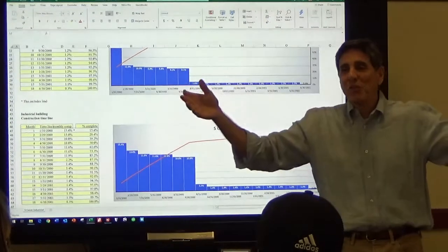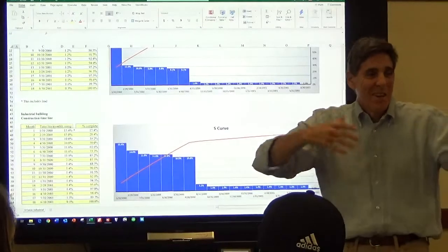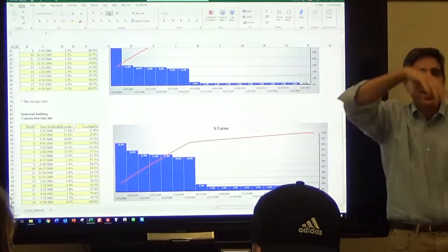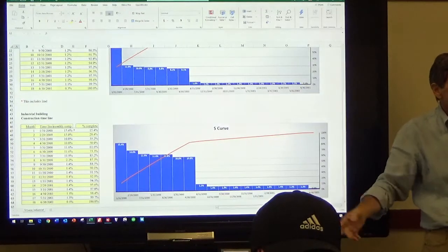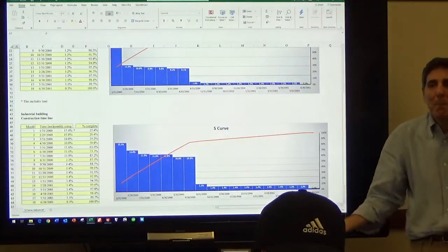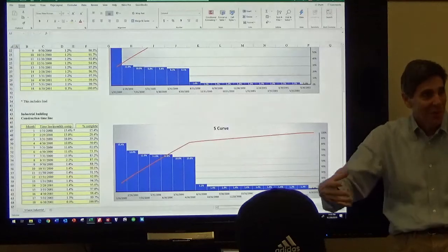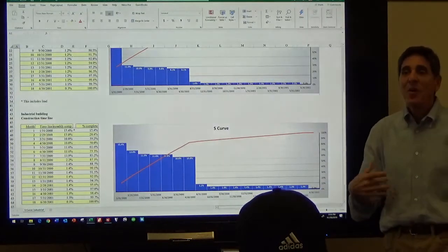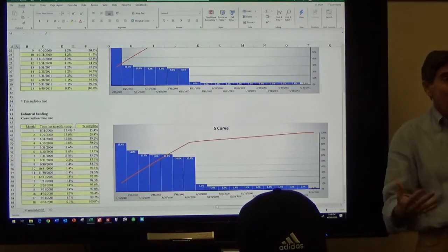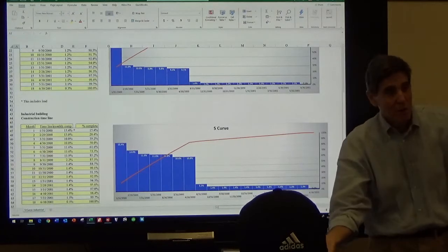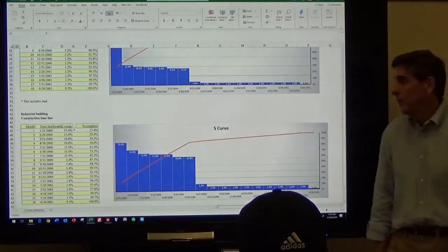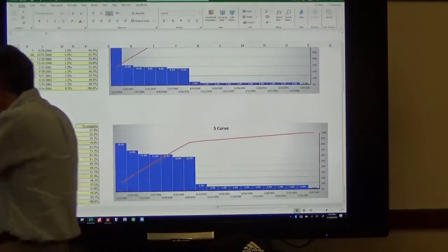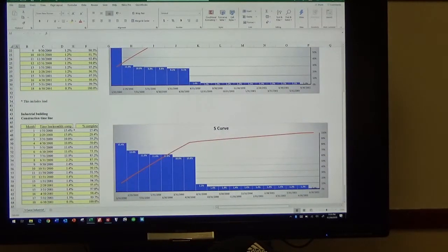It's been built for 6 months and it's still not done. The shell's there, it looks like it's all done, and it's still 3 months away. It's all little dribs and drabs. The big pieces that cost a lot of money, the concrete, the steel, the glass, come up front. And then all the interior finishes take a little bit of time to do. So that was just something I wanted to show you.